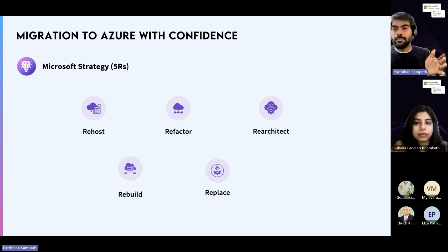So what we suggested to the customer is to just go with a rehost. Within 3 months, we gave them a clear estimate of how we would rehost. We migrated all the workloads directly, lift and shift, from their on-premises to cloud. That's the first win, to cut down the existing data center and also reduce the license cost overhead. That helped the customer take the first step of the phased migration.